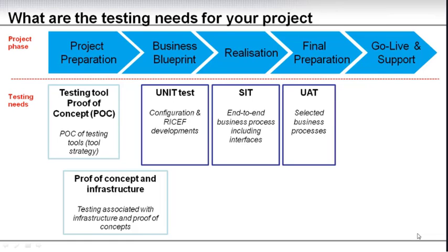After that, you have user acceptance test. It can be all, or normally it's only selected business processes based on criticality. You really want to focus on the customized processes and not the standard SAP process. That part should be low risk. So some projects test everything, some test a subset, some test several cycles, some test an overlap with integration test and UAT to speed up things, to accelerate your schedule. So all three tests is going to normally take place during some part of the realization phase, and the UAT, you really want to try and complete it early on in the final prep.